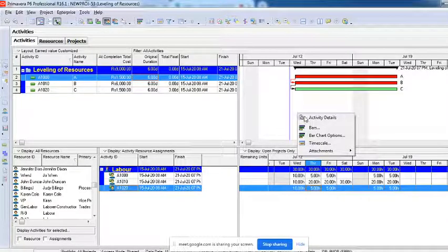This is very important. This is an iterative plan. This is a rolling wave plan. What do you mean by this? You definitely cannot do it 18 months, 16 months, 12 months or even 1 month early, because you don't know how many resources will be available. Committed resources are not there at all. What is committed is probably only a week's worth of resources. You know what is available in the next week. How many of them will be available for your project?